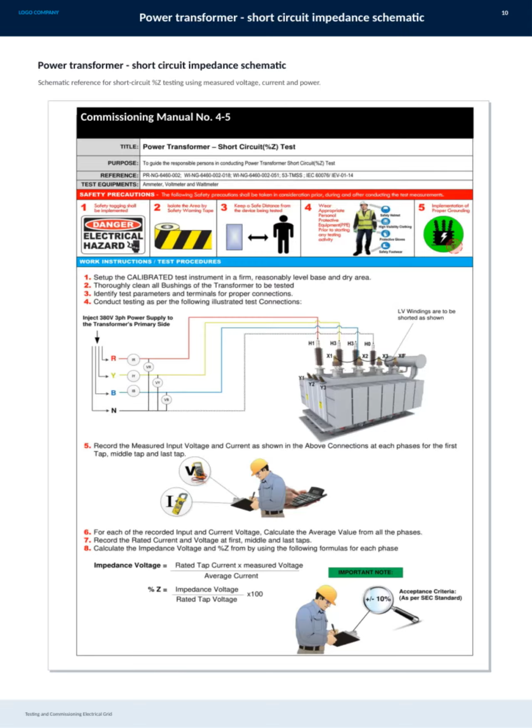Here we have the schematic for the power transformer's short-circuit impedance, which is essential for proper testing and commissioning of the electrical grid. This diagram serves as a key reference for short-circuit percentage impedance testing by using measured voltage, current, and power values.